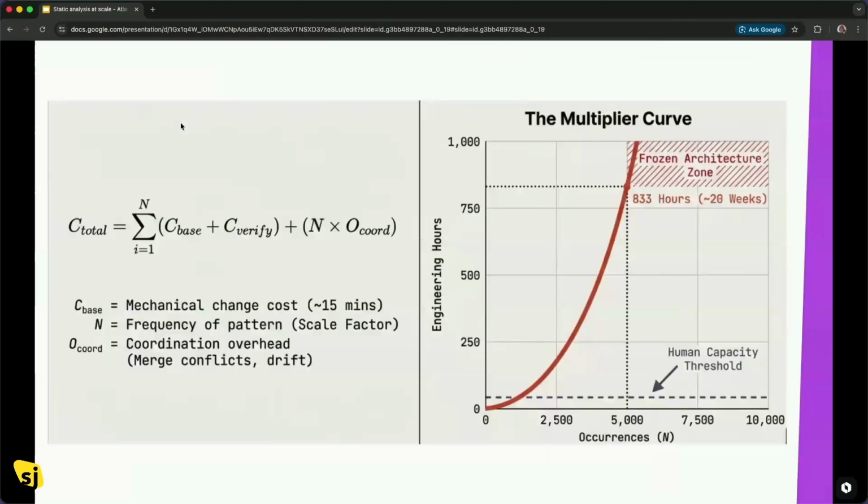Maybe? So this is a nice slide that I found somewhere, which talks about that scale paradox, where everyone's like, if you've got a lot of people, you've got a lot of things to do, surely you can just coordinate that outwards. Anybody who's done that sort of coordination across a bunch of teams ends up realizing there's actually an overhead to coordination, right? All those teams you've asked to do something come back to you and say, hey, what about this scenario? What do I do here? Or, hey, that tool you gave us doesn't work anymore. Or, actually, we can't do this in this timeline. Can we have an extra 6 months? We can't do this timeline. Can we have an extra 4 years? Maybe we'll get to it then. Actually, our last manager agreed to this. We have no clue about this. We're not doing this anymore.